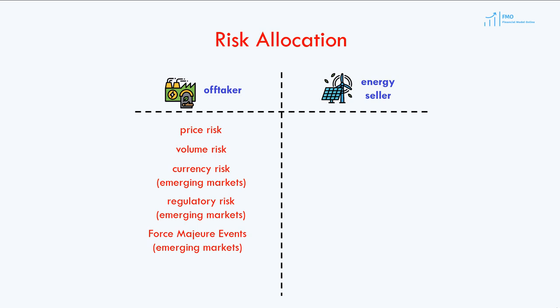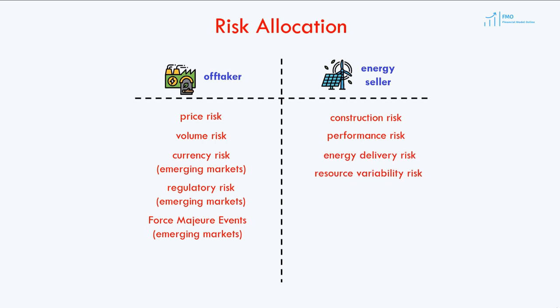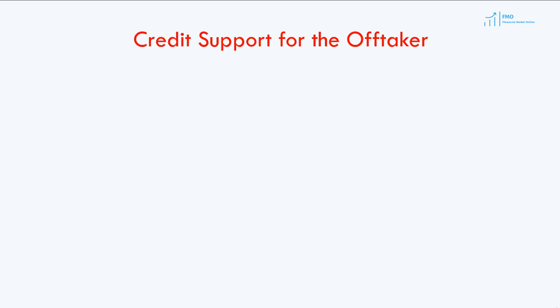When it comes to the risks allocated to the energy seller, they include risks associated with construction, operation performance, energy delivery risk, and resource variability risk. Since both the off-taker and the energy seller take on significant risk under the PPA, each party wants the other to be creditworthy. Typically, in developed markets, the off-taker is an investment-grade utility, which is sufficient to mitigate the counterparty risk.